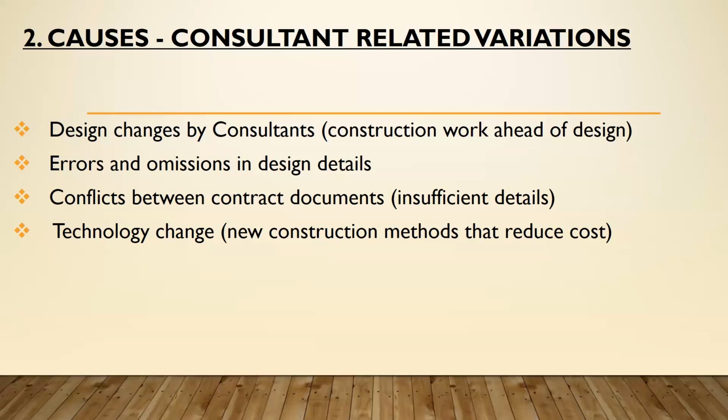Also, conflict between contract documents, where we have insufficient details, where the specification says something else, and then the bill of quantities also states something else. It also brings about variation.